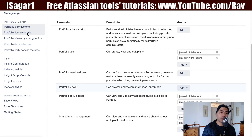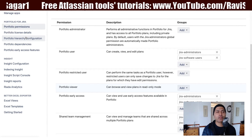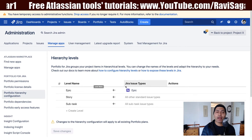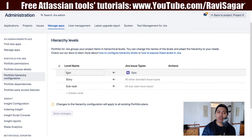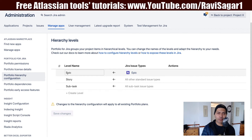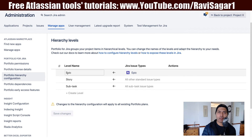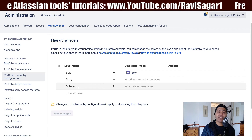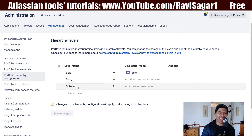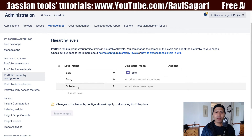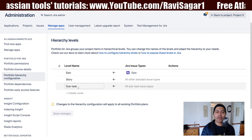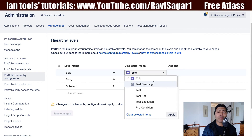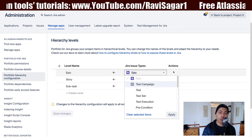The second option is portfolio license, which is quite obvious. The third option is the option to configure the hierarchy. In Jira Software, we have three levels natively out of the box — Epic, Story, and Subtask. But in Portfolio you can have more than three levels, and we will look at different levels in future videos. This is where you define those levels and select the issue types that are applicable for each level.